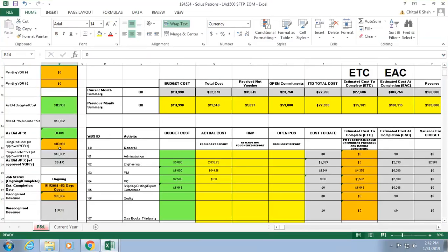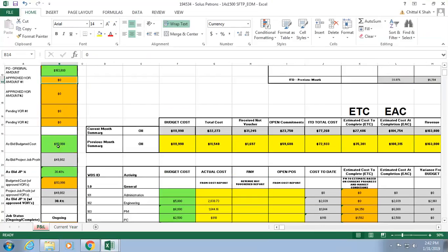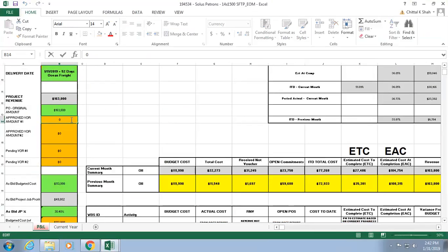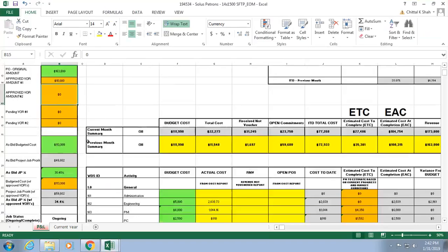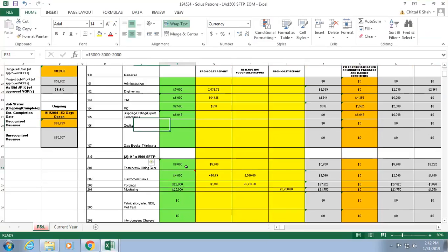So let's say an example. I've sold the project already. Then the customer wants extra studs. When you do a VO, you decide the margin on it. Sometimes, based on the project and the customer and the urgency of the need, you might have a higher margin on it. So you have your project at 30% margin. You sold your VO at 45% margin. When you go and add that VO, let's say the VOR was for $10,000, and that's going to cost me $2,000 in my fasteners. So I'm going to go here and say additional $2,000.